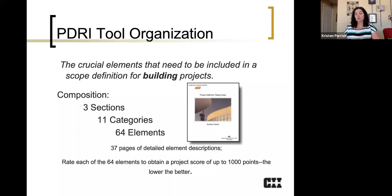How are these tools organized? We're really only going to look at the building project for this case, because in the FHC, that's sort of what people are doing. So what we have found is that we've listed the critical elements that need to be included in the scope definition for building projects. So this comprises three separate sections, the basis of project decision, the basis of project design, and the execution approach, 11 categories, which you'll see detailed in future slides, and 64 elements. This comprises 37 pages of detailed element descriptions, and you rate these elements to obtain a project score. Again, as I mentioned previously, this could be as high as 1,000, and the lower the score, the better.